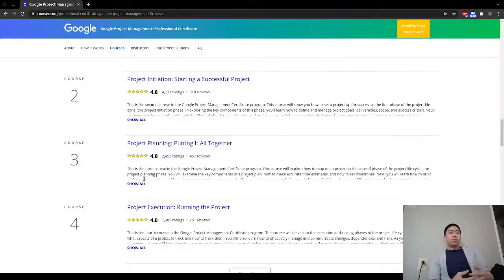Of course, we've been introduced to some other methodology, like using Pivotal Tracker. Pivotal Tracker is sort of a twist on work breakdown structure, right? Where you break down the project into tasks, and then you make estimates using the point velocity of the point system. Similar idea here. By breaking down the tasks, you have a better understanding of each thing that needs to happen. Then you can make better estimates based on that.